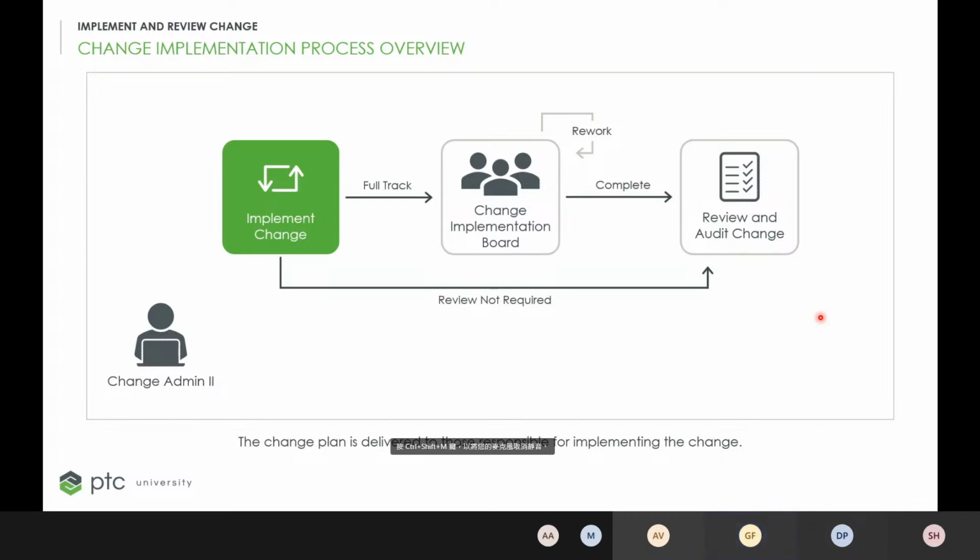So you see the reviewer still has a role to play, because he has this approval process also. Until the reviewer also approves the assignee's edits, all the documents and parts will remain in the in-work state. They will not be released.